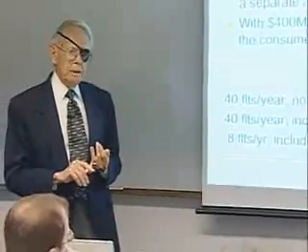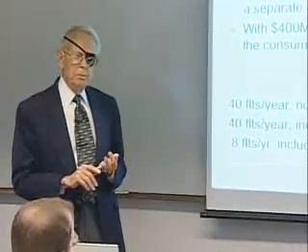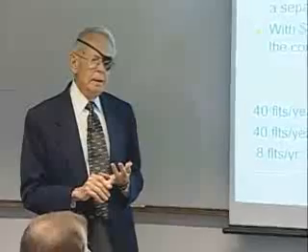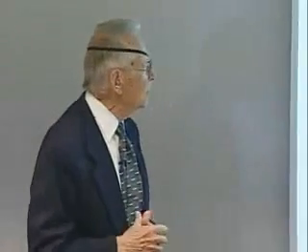I think we got up to 26 flights in 1 year. But most of them were down around the 8 or 10. And so we weren't up far enough to offset the cost of the research and development costs to get the operational costs down low.